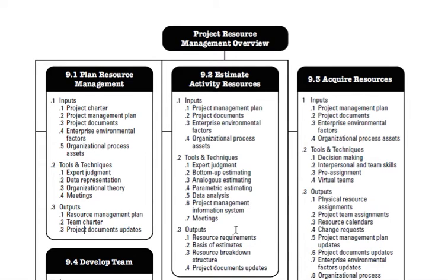The output will be the resource requirements for the project, and you will issue the resource breakdown structure. And for sure, whenever you are estimating, you have to provide basis of estimates, and you will update the documents, because maybe you did something in the WBS and forgot something, or when you were defining or sequencing activities you forgot something. So now you will update the project documents if required at the time of estimation. Maybe the wages change, maybe the hourly rate changes.